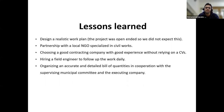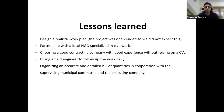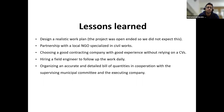The lessons learned from my part include: design a realistic work plan since this project was open-ended and we did not expect what we would need to do. For rehabilitation activities, consider partnering with a local NGO specialised in civil works — Al-Ghad is specialised in child protection and education, not construction. Also, choose a good contracting company with solid experience without relying solely on CVs. Hire a field engineer to follow up on work daily, and focus on providing an accurate, detailed bill of quantities in cooperation with the supervising municipality committee and the executing company.